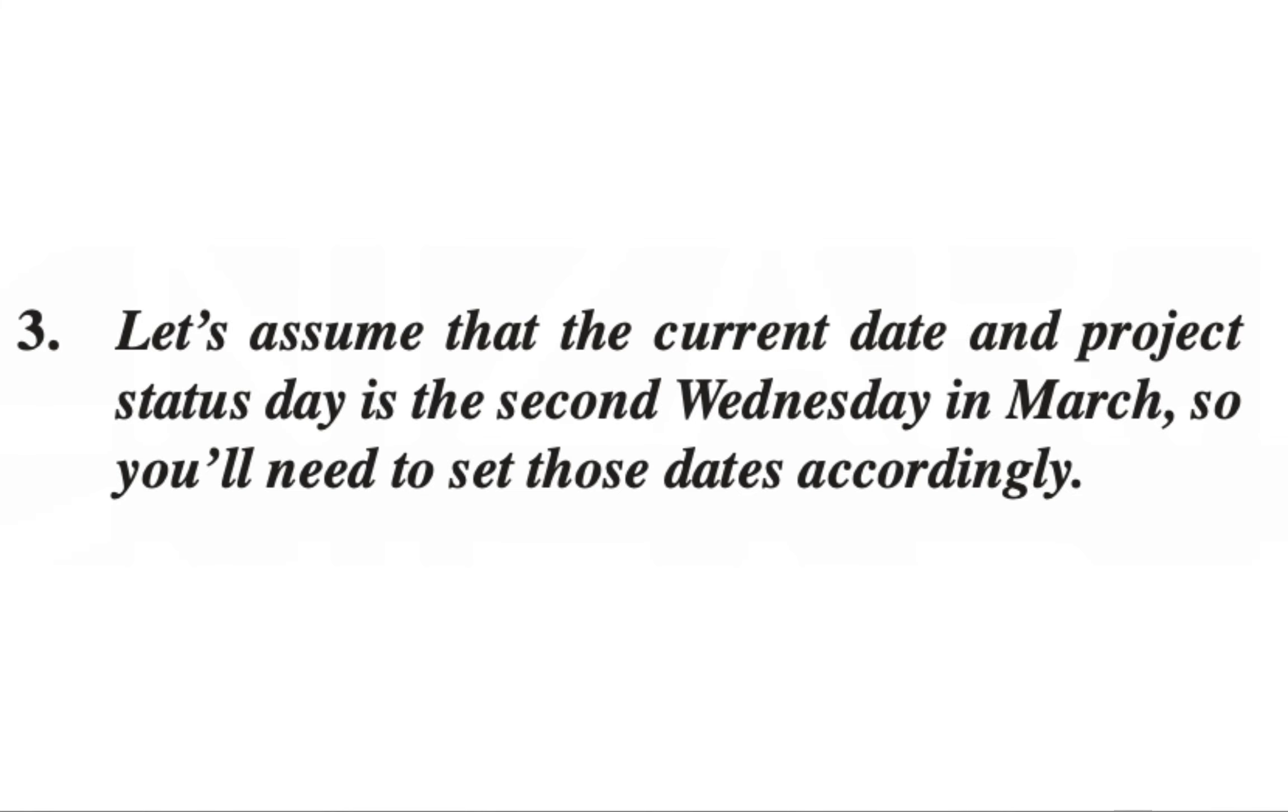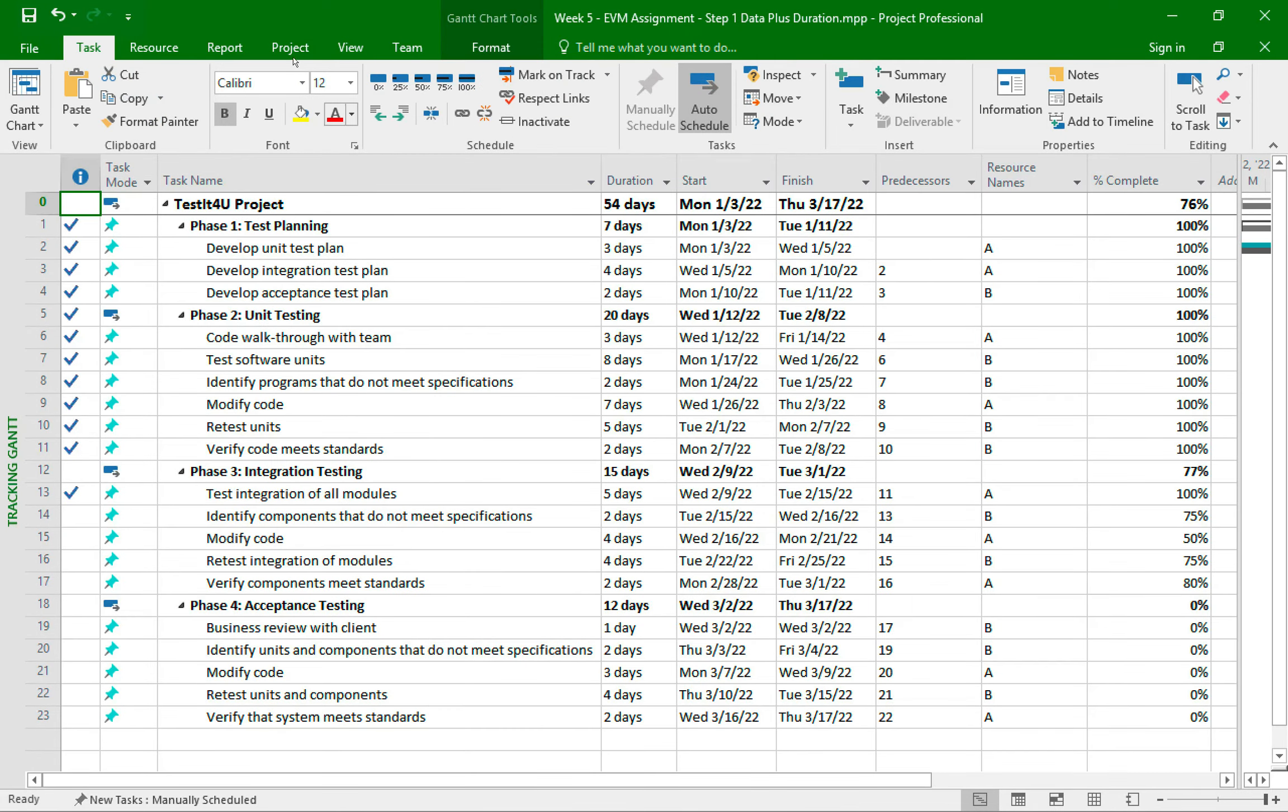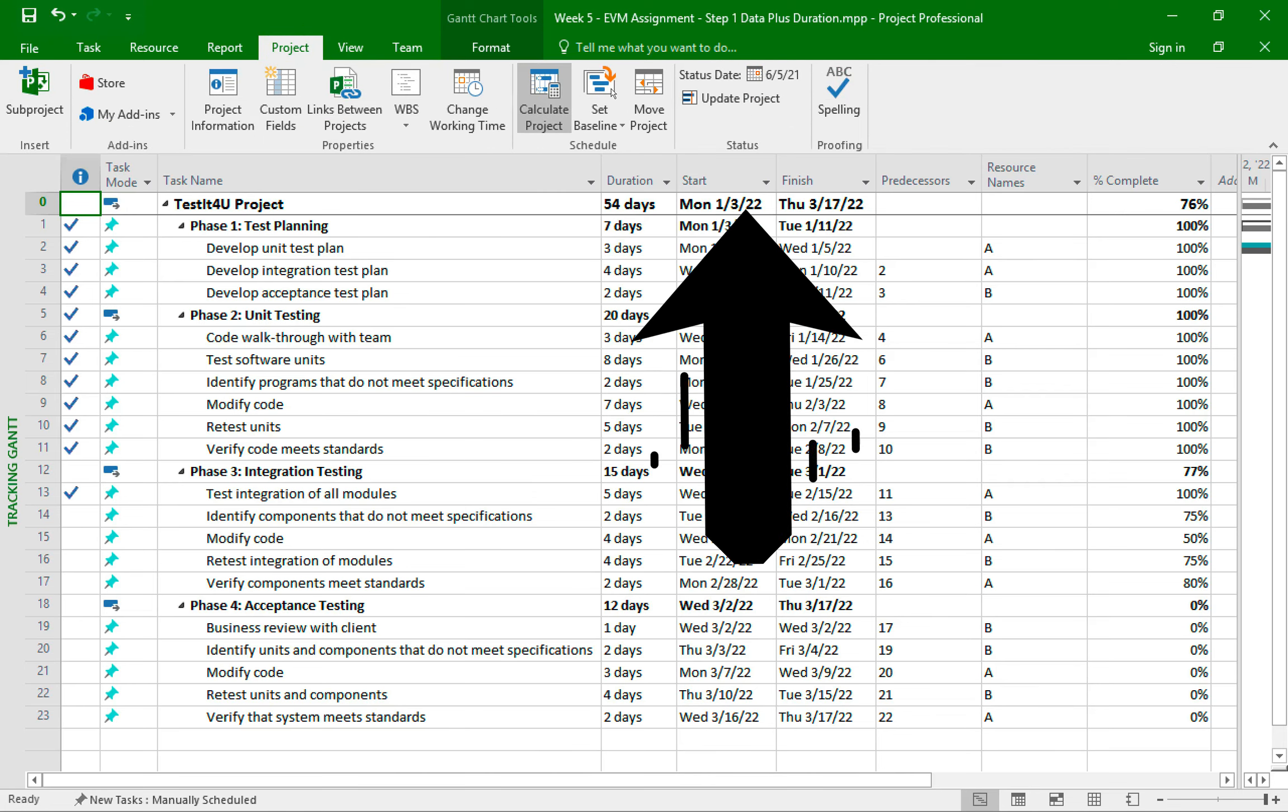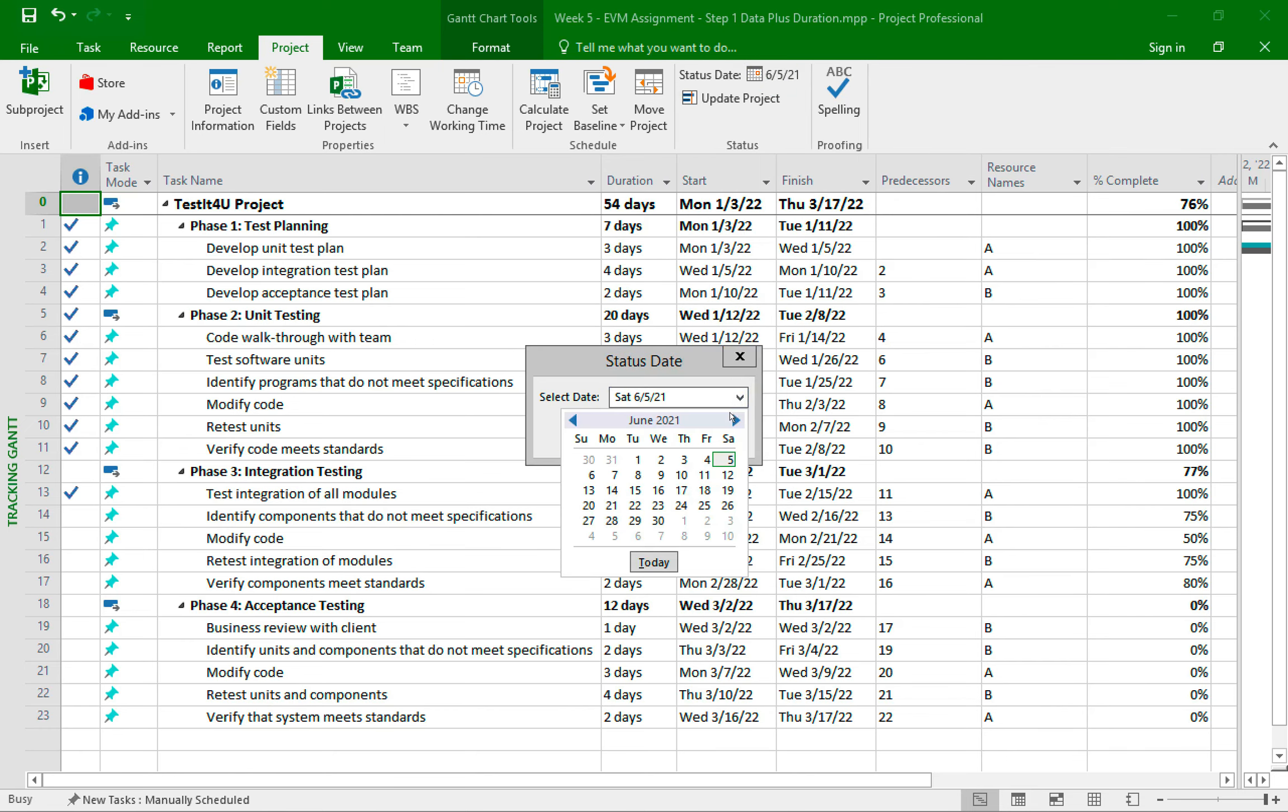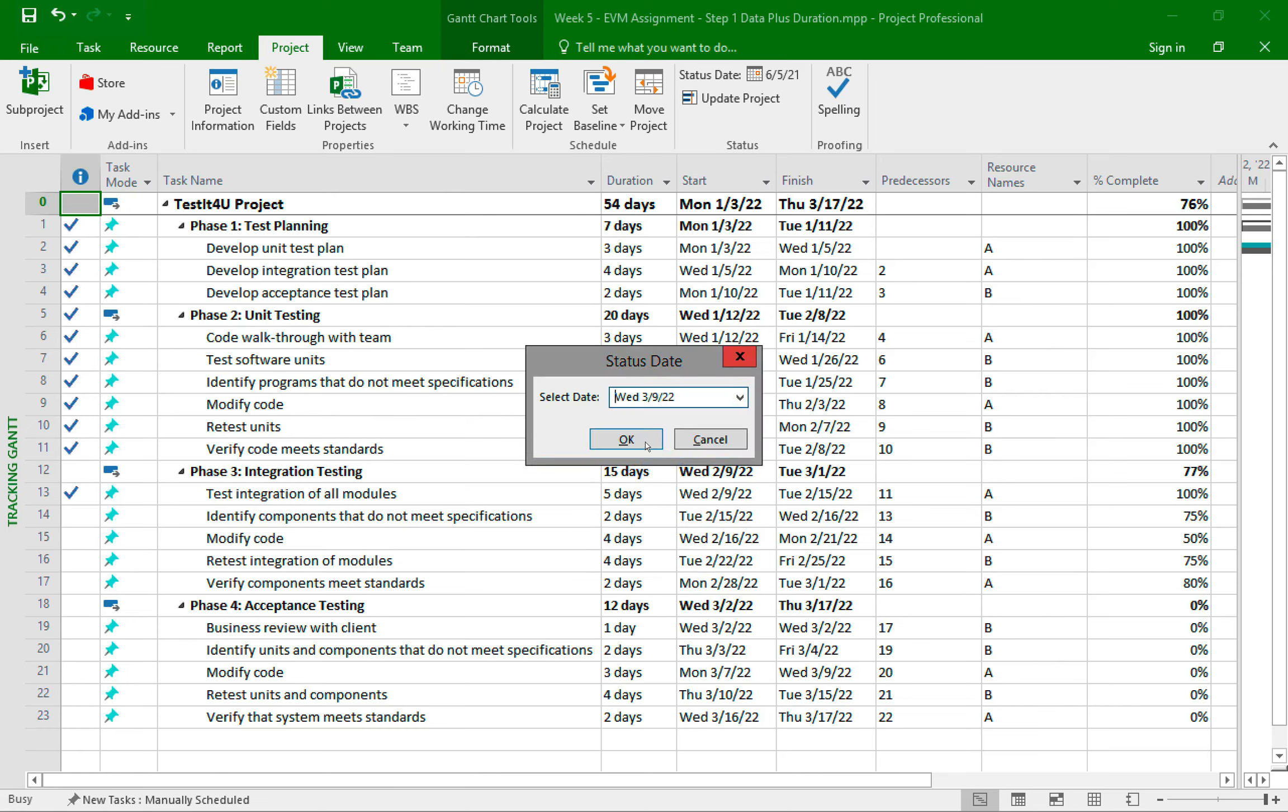So to update the status date of the project, I'll click on the project tab. Then in the status group, I'll click next to the status date. And I'll choose the date that is the second Wednesday in March of next year. And then hit OK.